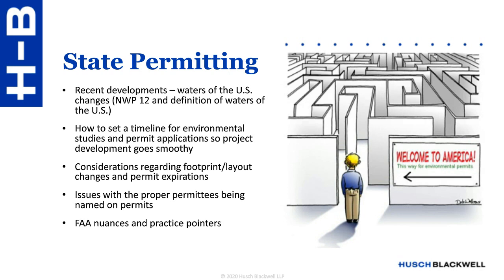that's needed. And as to each permit: the agency, the plan for obtaining the permit, the responsibility for obtaining the permit, what sort of ongoing monitoring would be needed, and in particular the timing of the permit, synced up with the development calendar.